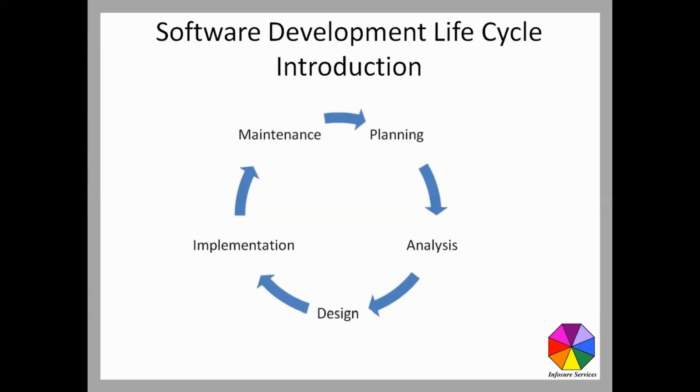So it's a gap. Detailed analysis takes place even to gather requirements on gaps, and how those gaps can be designed, developed, and implemented. This requirement analysis typically goes on for large projects for 1 to 2 months.